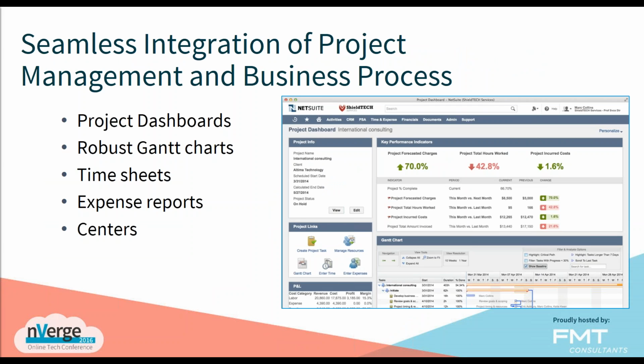So as mentioned a little bit before, with NetSuite we get seamless integration of projects, project management, and the business process. So whether we're talking about processing vendor bills, expenses, expense reports, timesheets, that type of thing, all of those processes that involve those transactions will update your project budgets in real time as they're passed through the system. So again, the project manager gets a very good feel for where the project stands in terms of its health.